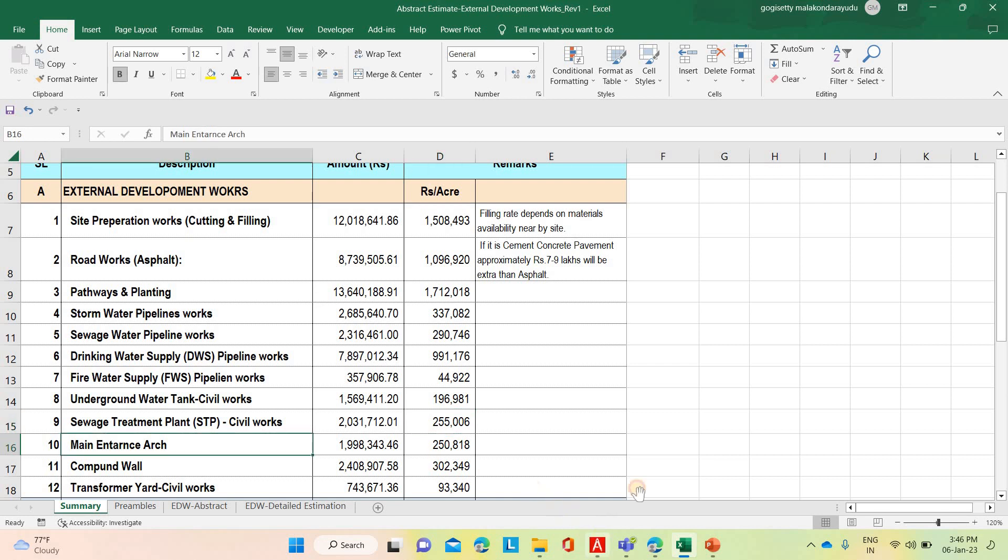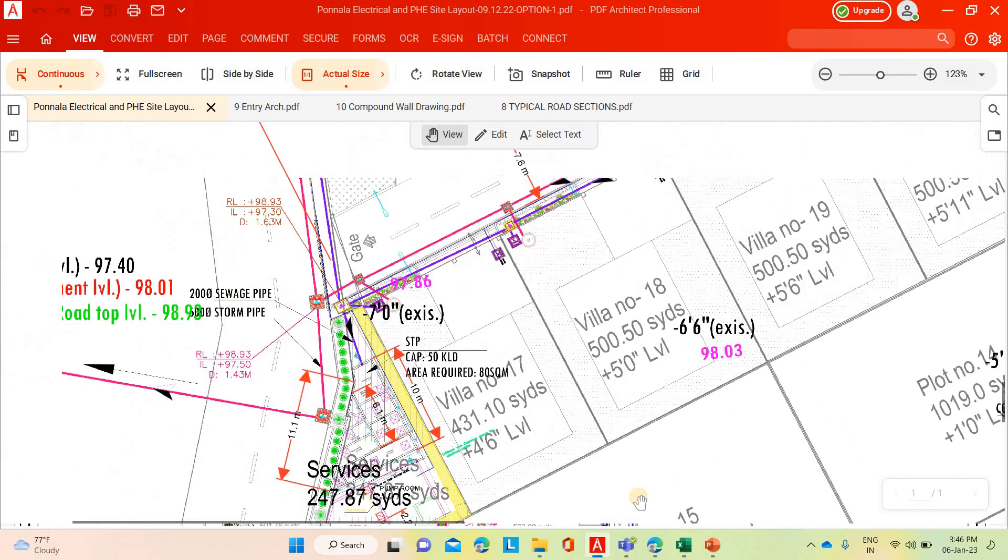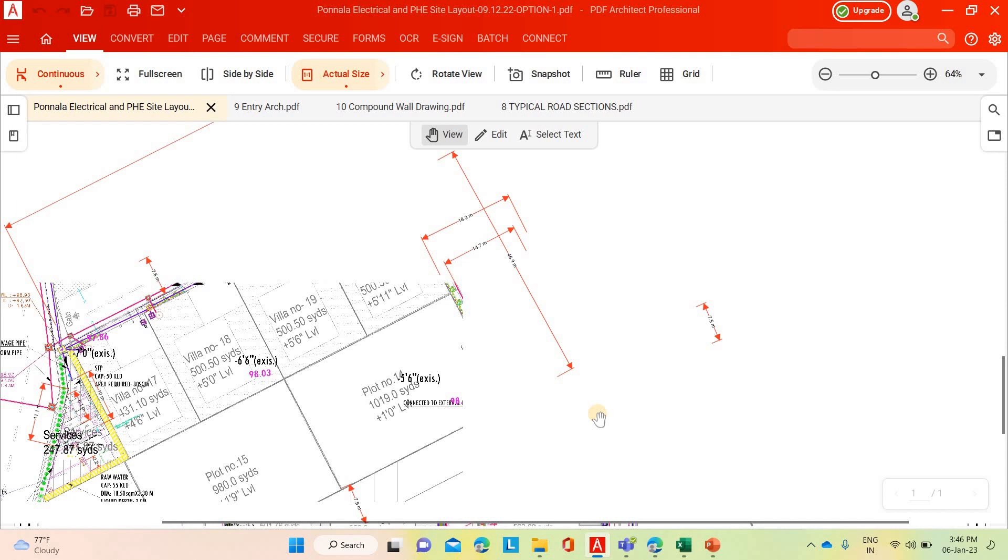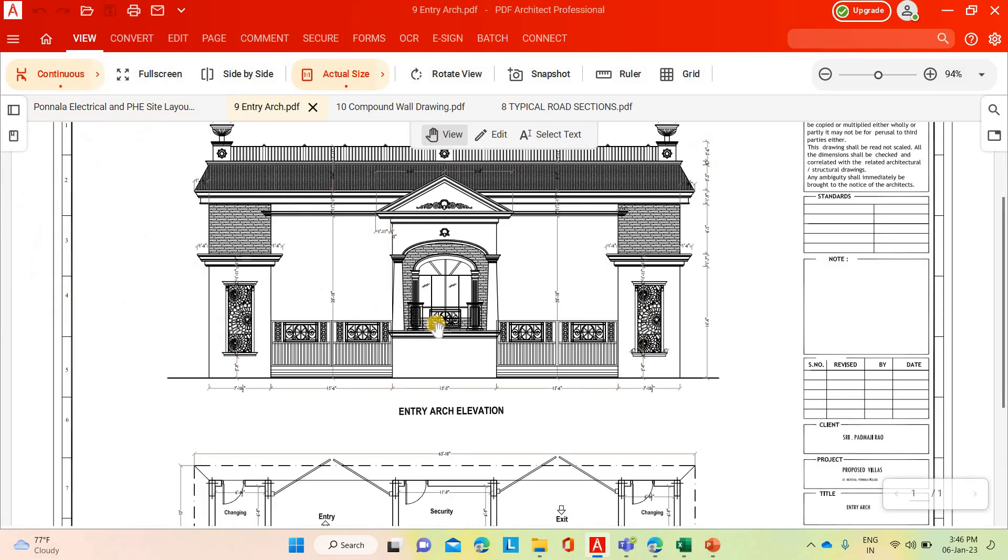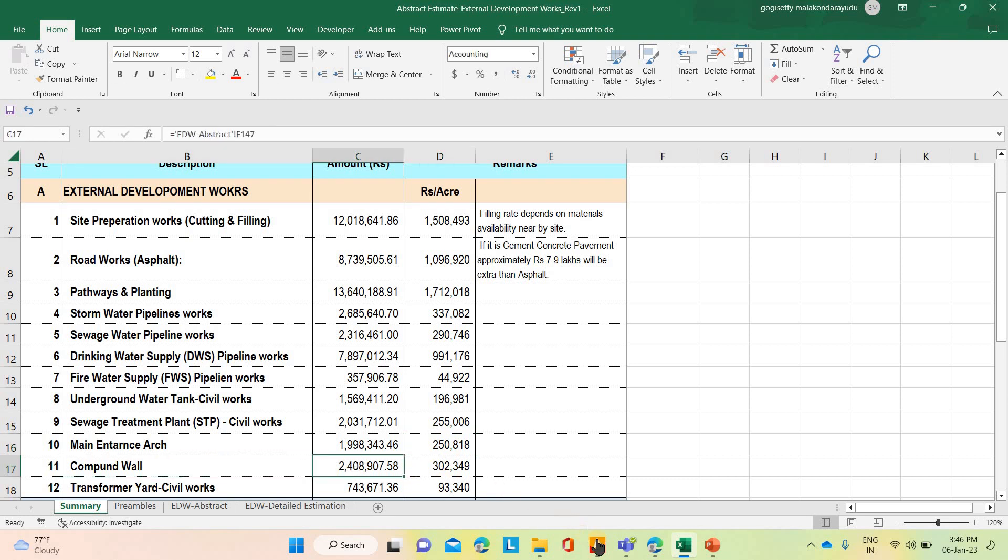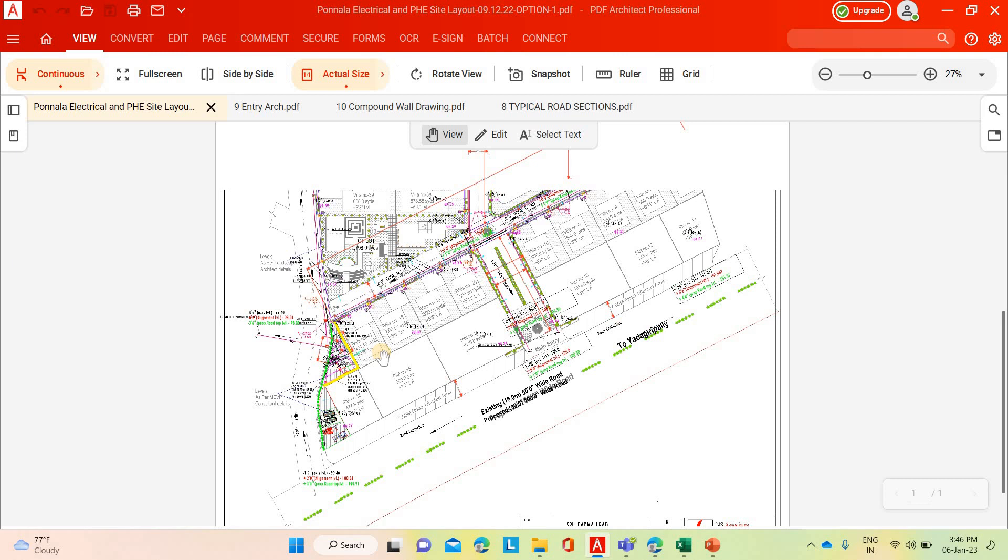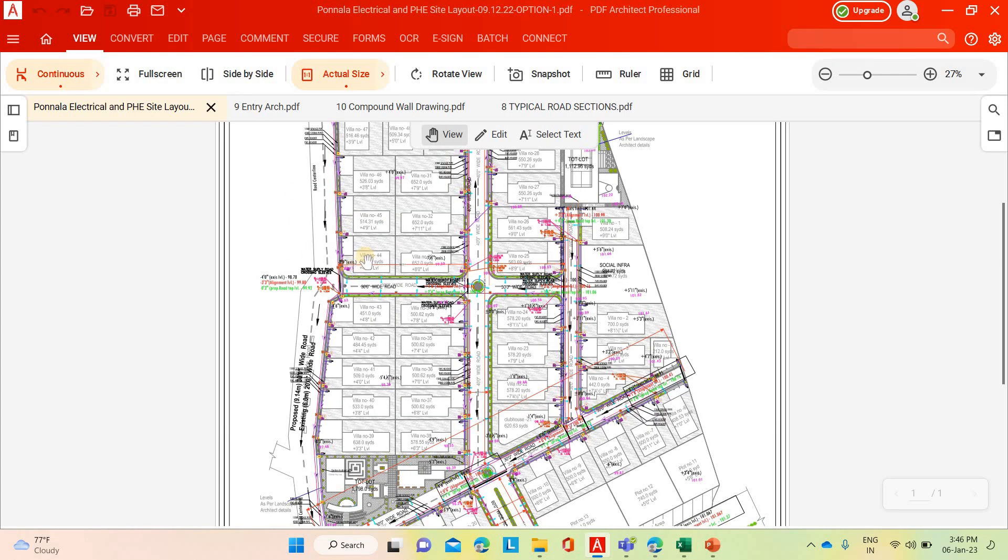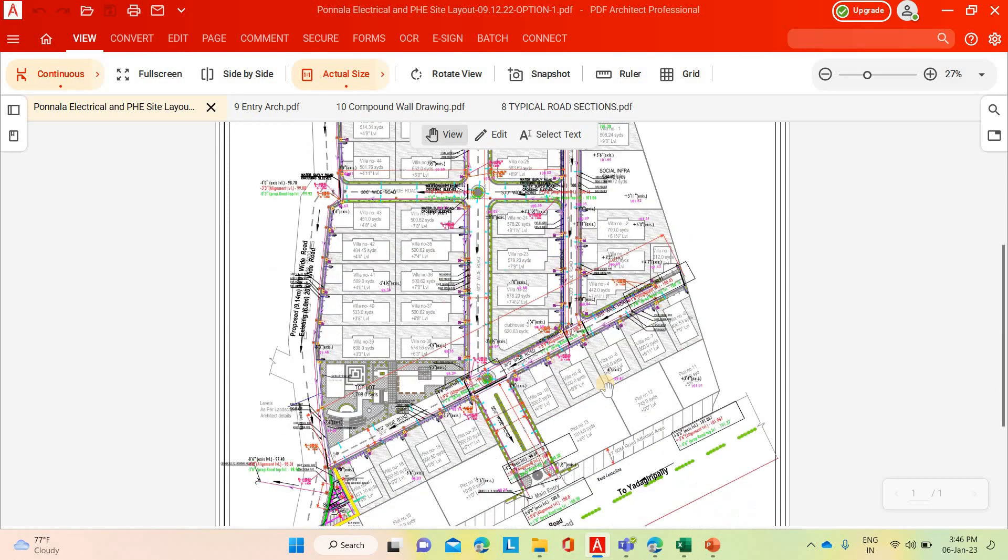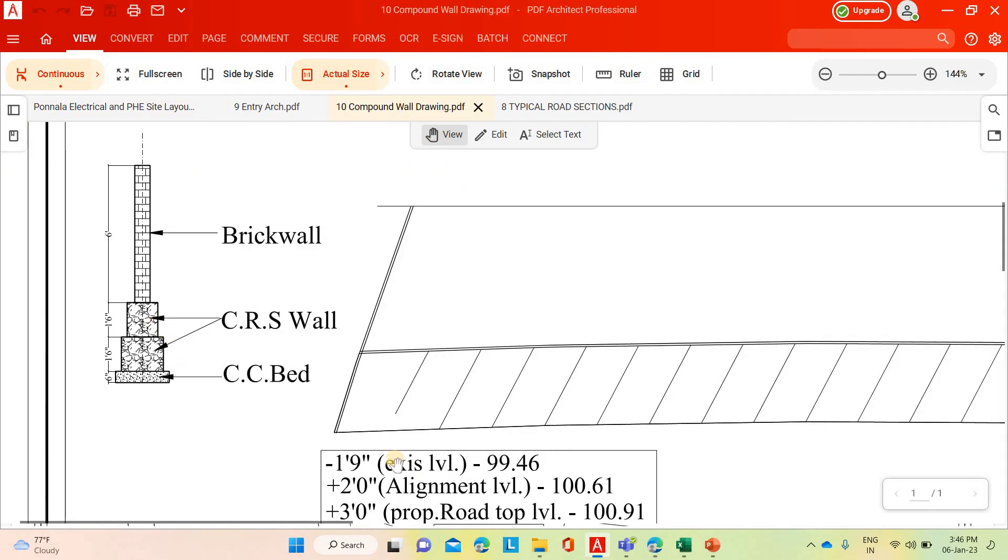Similarly, main arch. Main entrance arch. Main entrance civil cost is coming 9 lakh 98,000, per acre 2 lakh 50,000. Same for compound wall. This is the compound wall. Actually, this site we are having only two sides compound wall. Front side and right side because other two sides are existing roads and the villas also facing that place. Individual each villa compound wall will be there. We need to consider only permanent compound wall from right side and the south side. This is the compound wall typical cross section.